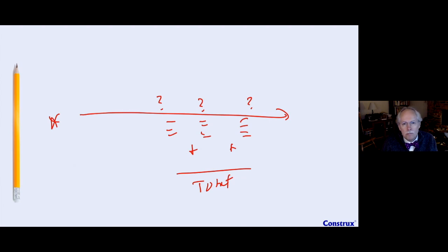And this has two major faults with it. One, it doesn't deal with uncertainty at all, right? Because I'm basically listing all the things that are going to happen, and I don't know how to deal with the uncertainty in that kind of process, except trying to put on buffers. And then everyone's putting on buffers. And when you put buffers on each of the subunits, all of a sudden I'm massively over buffered and it's really too big, right? That's going back to probability theory again. That's one thing. And the second thing is that I don't know any of this.